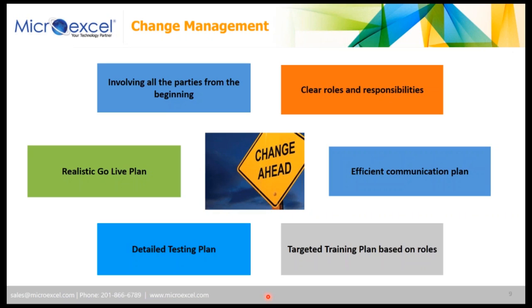Of course, it's important to have clear roles and responsibilities. With the new system, certain roles will change. The way I was doing it before is changing. Tomorrow it's going to be different. And that's something that is important to be prepared for, in order to later deliver the right training, which has to be planned based on the roles. So you're not training a manager the way you're going to train an employee, or a HR business partner or HR administrator. So that's something that you really have to look into in very much detail.